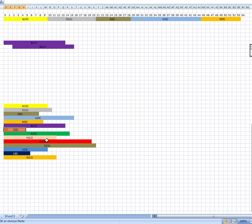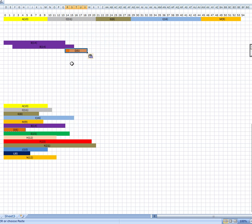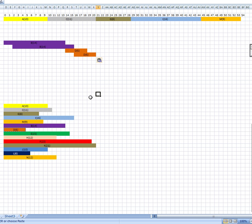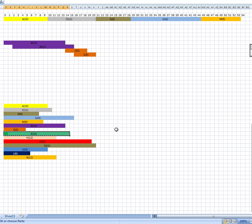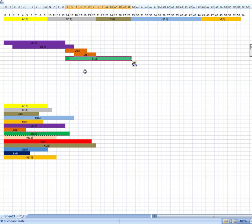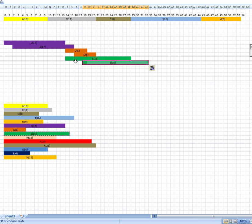So what this represents is B could start at naught and finish at 14. But it doesn't have to. Because it doesn't have to finish until 16, it could start as late as 2. And this gives B a total float of 2. D can start as early as 14, which is here. Start as early as 14. But it doesn't have to finish until 21. It takes 5, so we don't have to have started until 16 to have finished by 21. That's D. So E is next. E could start at 14 as well, if we're ready. E doesn't have to finish until 33. It takes 15, so it doesn't have to start until 18. And that gives E a total float of 4 there.